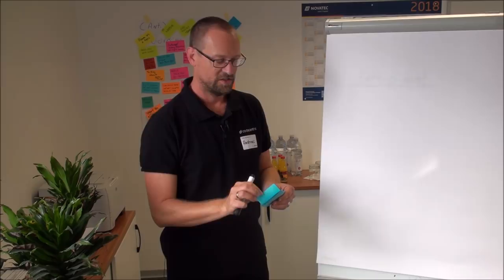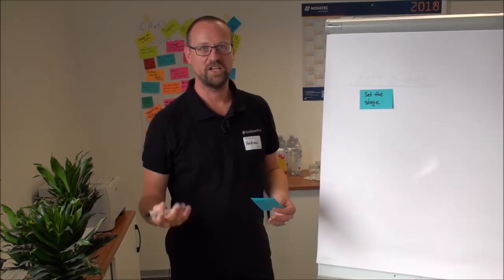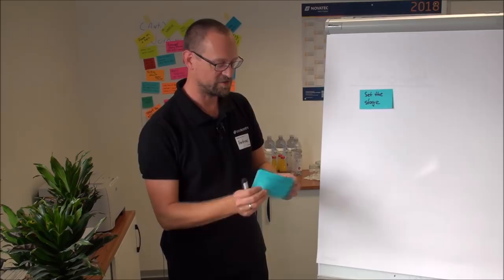So you start with a phase called set the stage. Everybody is checking in, saying something, getting warmed up to the retrospective.